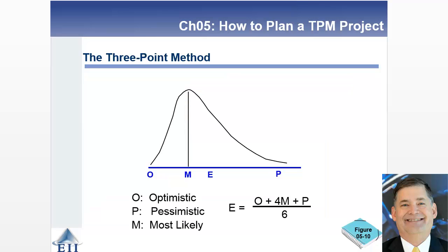Okay, the 3-point technique is going to be similar, except what you're doing is using a mathematical formula where you're looking at the most optimistic, pessimistic, and most likely, whatever your mean is, to occur, and then you've got a weighting system associated with doing it. So less communications, but basically the same idea. And then that wideband Delphi is just the same as the Delphi, but again, more communications, more facilitation to make sure that everybody is on board and is communicating effectively between each other why they're reaching decisions on their estimates.